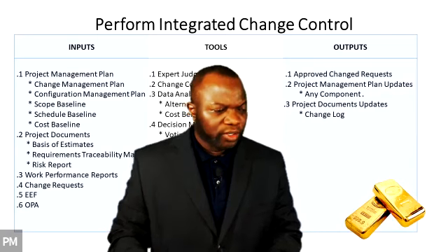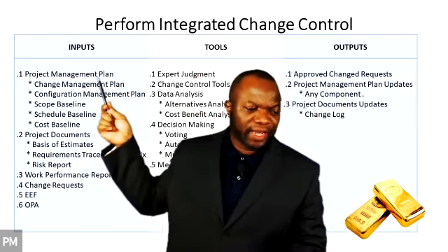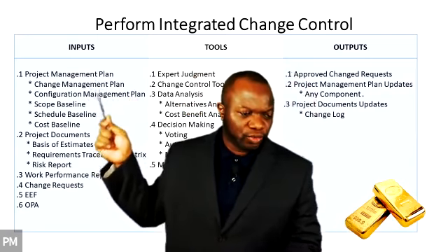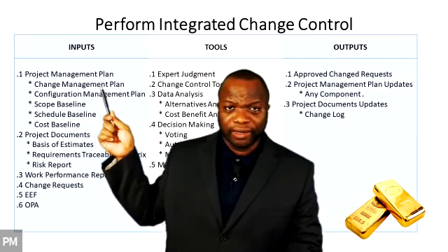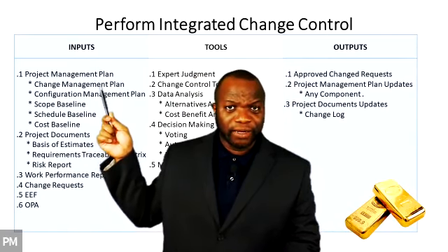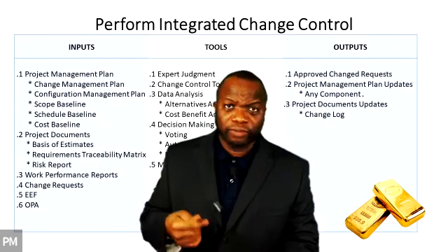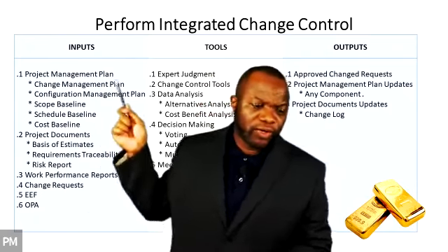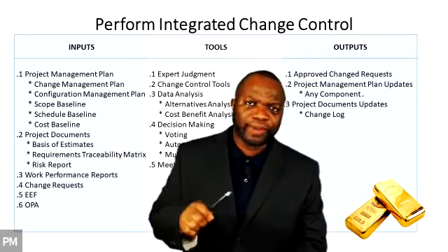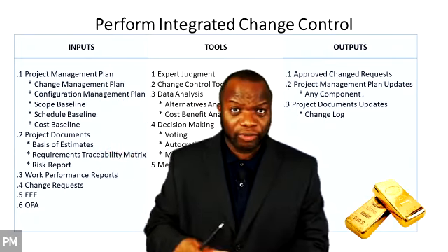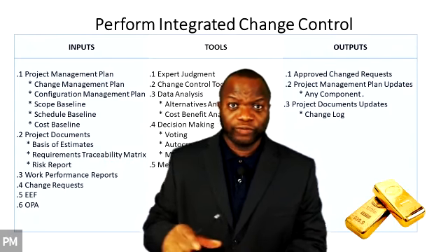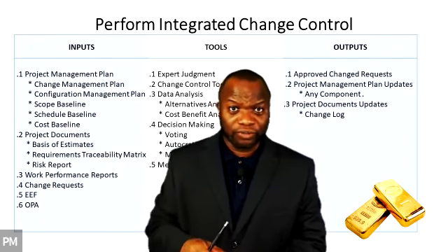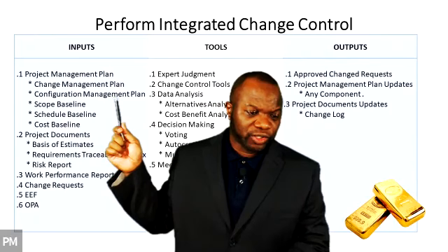All right, so right off the bat, the project management plan contains these two, talked about on page 89, your change management plan, how changes will be managed on the project as far as the baselines and documents. And then we go into configuration management, which talks about how those configurable items, the features, the functions, and any control documents are going to be versioned.